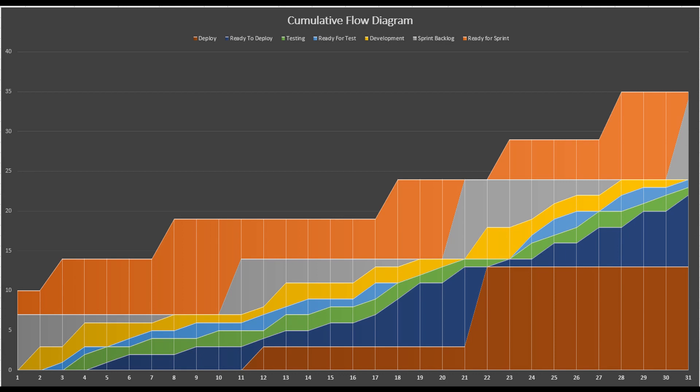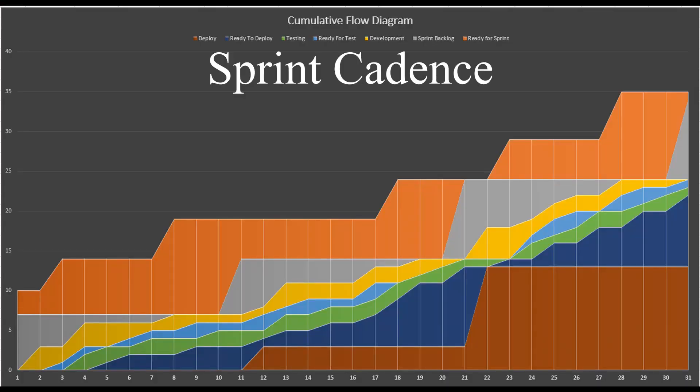I like to see those increases. This kind of tells me it looks like stepping steps, which tells me that along the way there is a set cadence that the team may be on. Every so often, for example, you might be practicing backlog refinement. I do know that this team does backlog refinement every Thursday, so when you see the count jump, that gives you an indication that there is backlog refinement happening. Also, looking at this, I can tell what their cycle is — it looks like about 10 working days, so about a two-week cycle for the team.